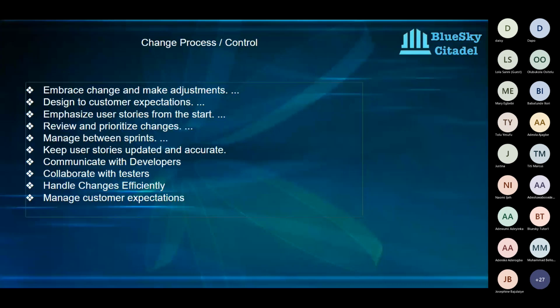Say they come to us now and say, oh, the business needs this feature to be developed. We know you guys started your sprint 2 days ago, but we need this to go into the sprint. So this is me saying, oh, okay, that's fine. But I need to review this new requirement or change with the team, with the developers. We need to also prioritize it, because if every change that comes in we accept and just take into the sprint, are we actually going to be able to deliver it at the end of that sprint? Have we looked at the implications and the complexities of that new requirement? Do we have enough capacity on the team to take it on? Do we even understand what it entails, or how big or small it is? Have we sized it, or estimated the work itself?